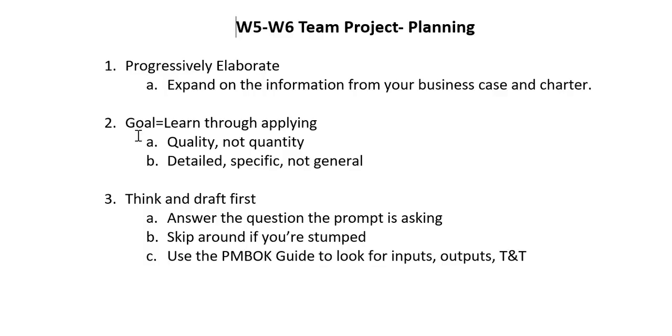Also, the templates that we've chosen are very detailed and specific because there's a large part of project management that is built up from the bottom, where we actually go through and figure out what all of the activities are, and then we figure out what doing each of those activities would cost in terms of human resources and how long each one of those would take and which ones have to be done before others.